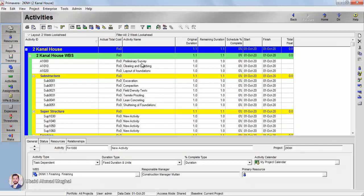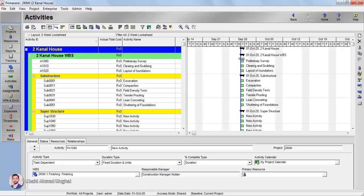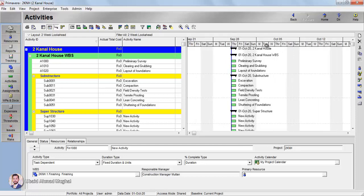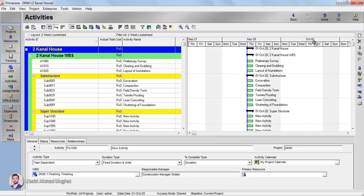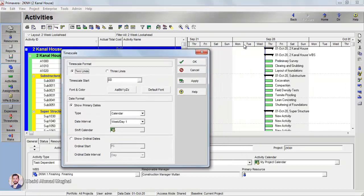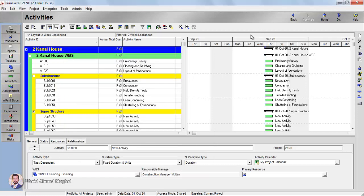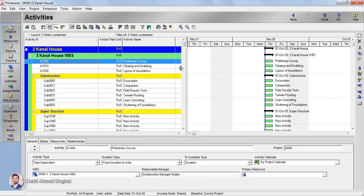To view the Gantt chart, click on the Gantt Chart option and it will be displayed. Currently all activities start on the same date. To zoom the timeline, click and drag the mouse to increase or decrease spacing. To adjust the timescale, right-click and select Time Scale. You can see Monday through Saturday on a daily basis. You can switch between two-line and three-line views, add a year at the top, and customize which day the week starts on.